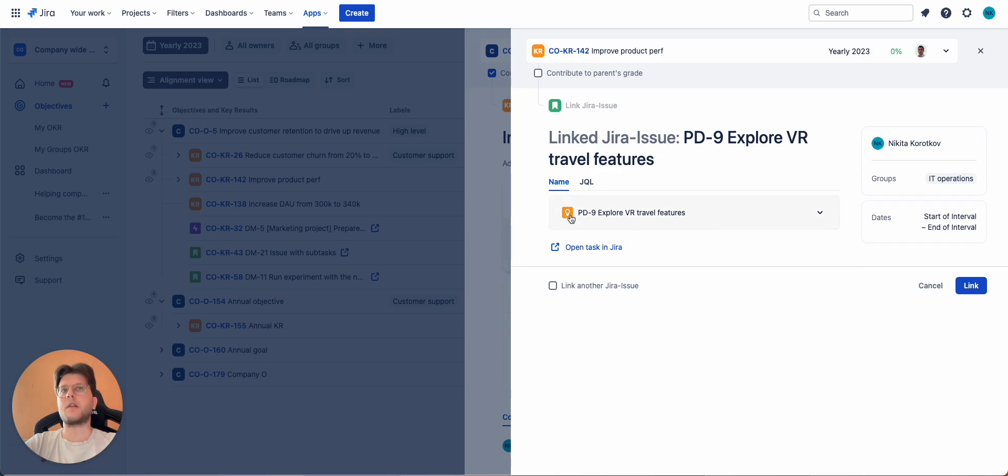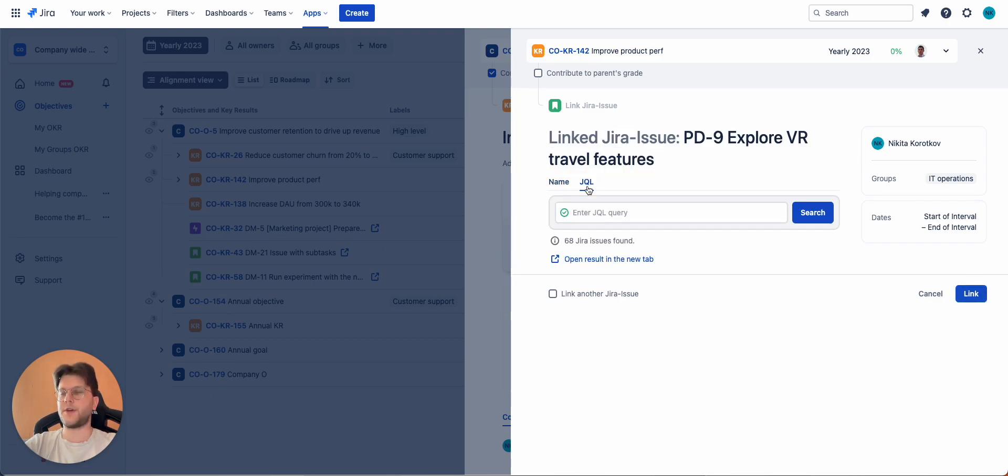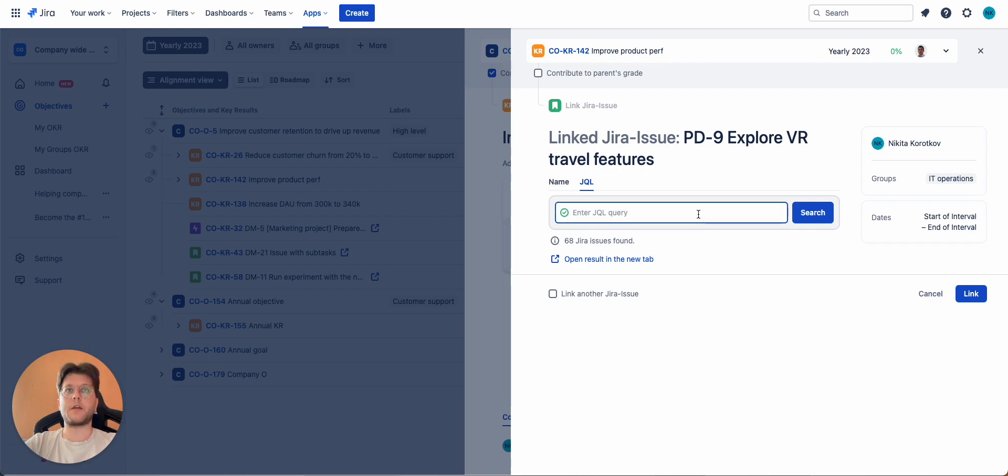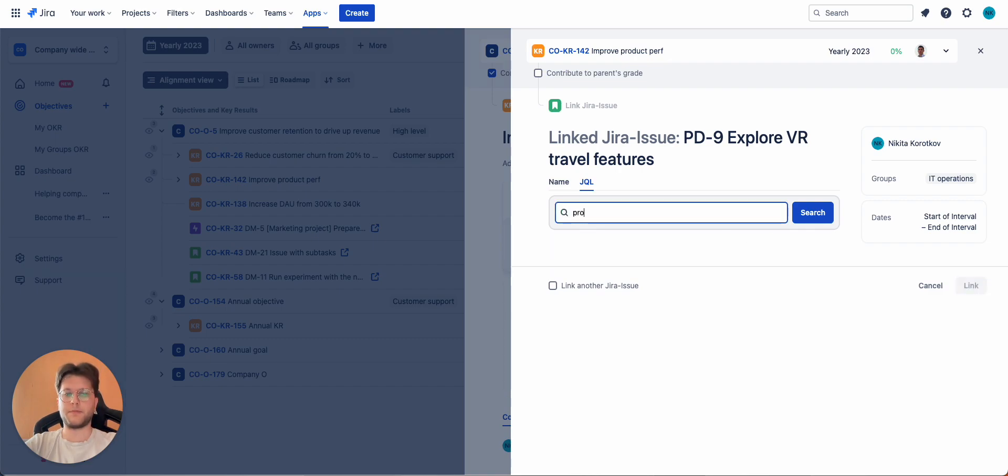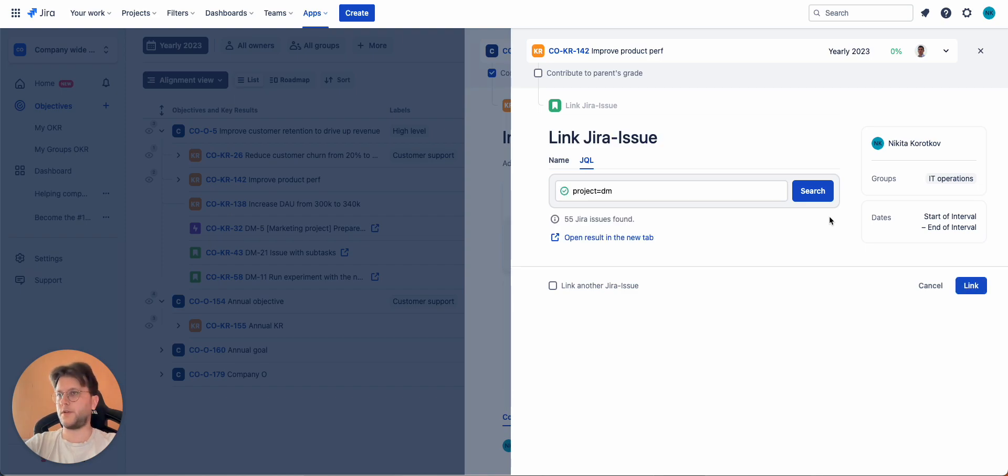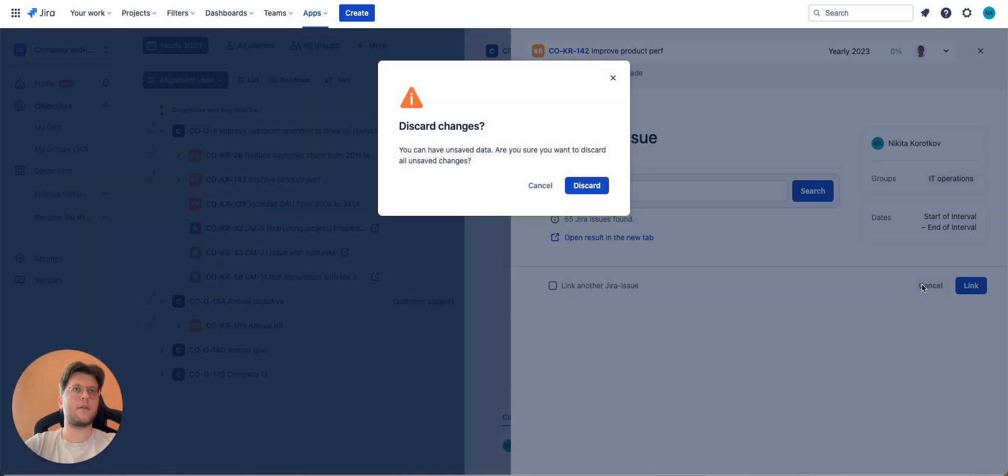The other way how you can link is JQL. It also allows you to link in bulk. Let's type something simple here. For example, project equals DM. Yeah, search. There we go. Found 55 Jira issues and you can link all of them with a single click of a button.